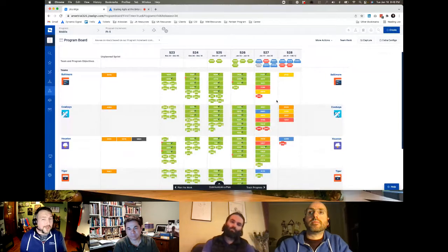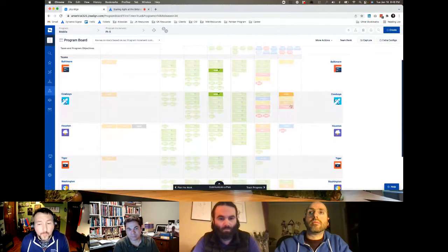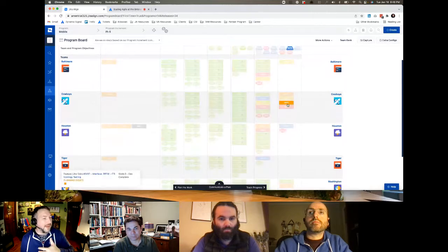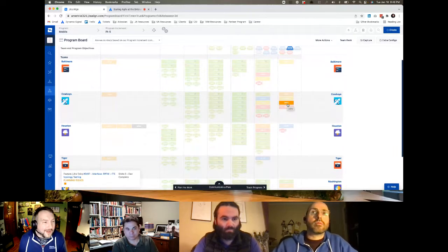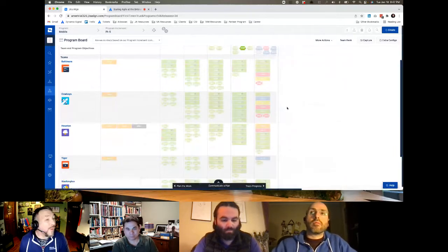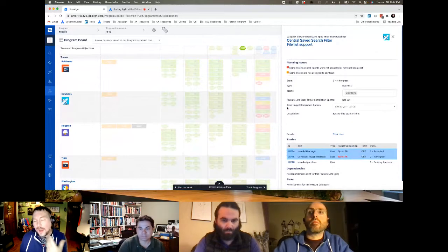And as you'd imagine, colors mean something here. We look at something in green, green is good. Red, not so good. As you're using this to plan, my big goal I tell teams is to come out of planning without any red and try to avoid the orange colors too, because those both indicate that you have planning issues. If you're heading into planning with issues right off the bat, you're already setting yourself up in a bad spot. And one of the nice things, it's kind of faux AI, is that it looks at what issues are there and helps make a decision to say, hey, why is this in trouble?